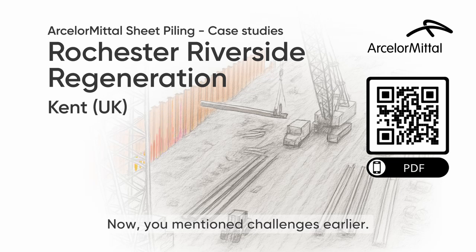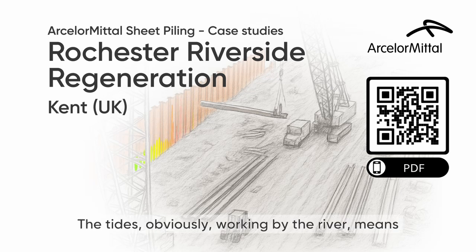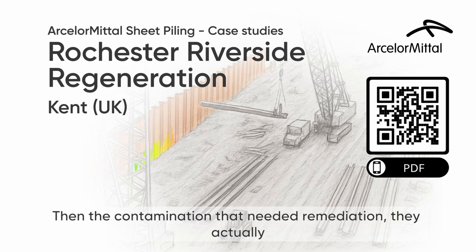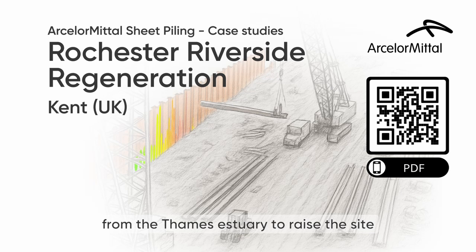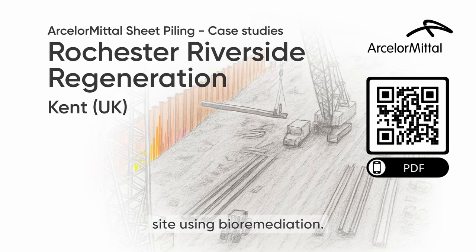Now, you mentioned challenges earlier. Contamination, old structures. What else do they have to contend with? It's never straightforward, is it? Never on a site like this. The tides, obviously. Working by the river means constantly factoring in the water levels. That must complicate things. It does. Then the contamination needed remediation. They actually dredged about 400,000 cubic meters of sand from the Thames estuary to raise the site levels, and then treated the contaminated soil on site using bioremediation.